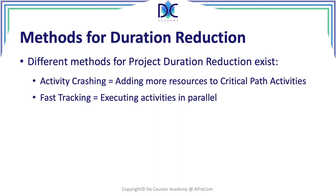Fast tracking is a different way of looking at duration reduction. Here we are going to execute activities in parallel. Note that we talk about activity crashing and fast tracking separately — fast tracking means putting different activities in parallel and planning it that way.